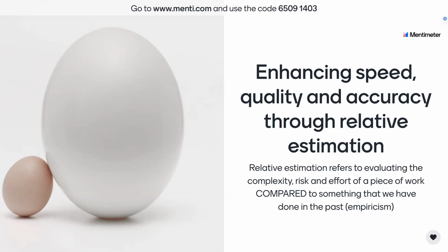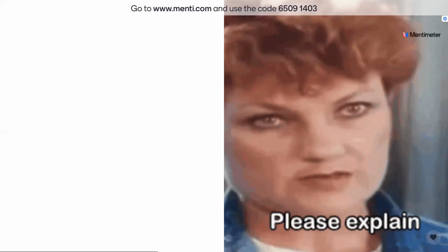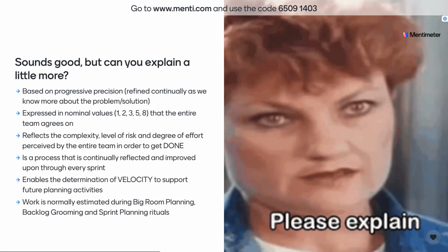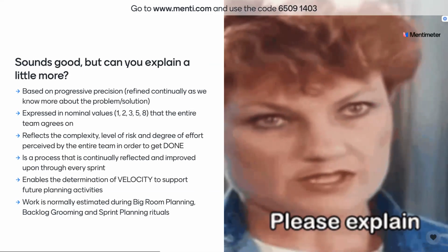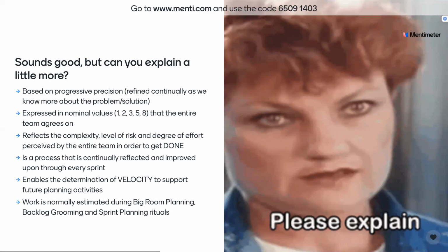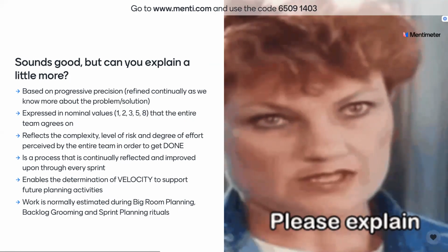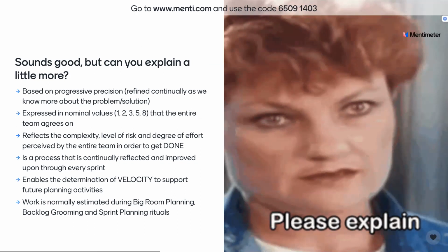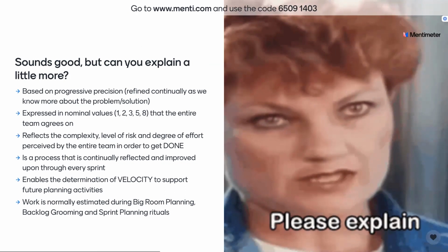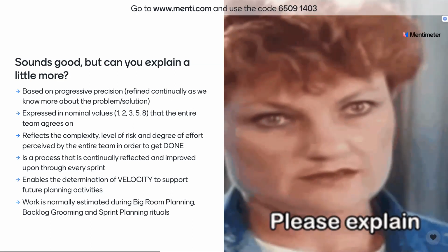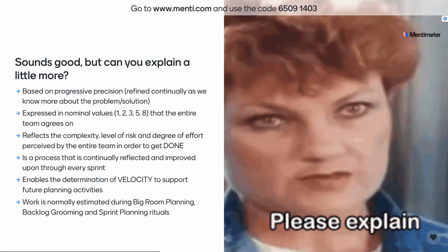It's a technique that is built on progressive precision. If we take this understanding of relative estimation a little bit further, it's about progressive precision. We can't know everything up front, because if we did, we'd spend all of our time planning and in workshops understanding those problems, and we wouldn't get as much work done. So it's based on having a little bit of information up front, and as we develop and learn more about it through our different rituals, such as big room planning, sprint planning, and backlog grooming, those are points where we can refine these estimates.